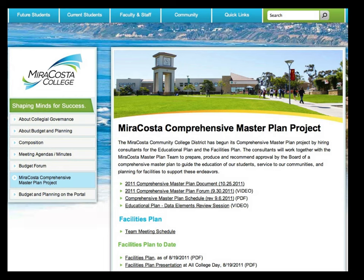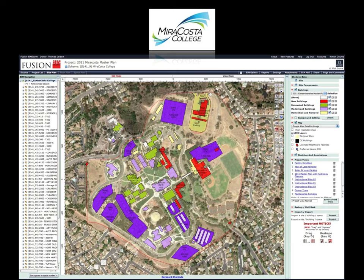MiraCosta has a comprehensive master plan in draft format, accessible publicly on the web, completed by HMC out of Irvine along with many consultants. HMC will be acting as the owner's master planning architect in this BIMStorm and help review projects as they come in. Over the last week or so we've been collecting background data, and even up until last night we were getting updated information on the MiraCosta projects. The red buildings on the campus map are new — we'll be focusing on two of those four red buildings and some site-related studies.